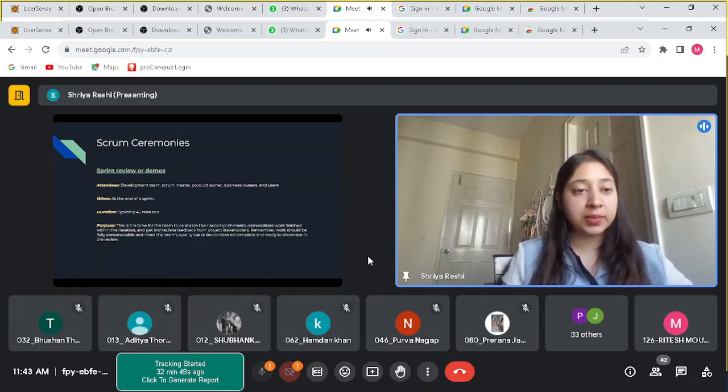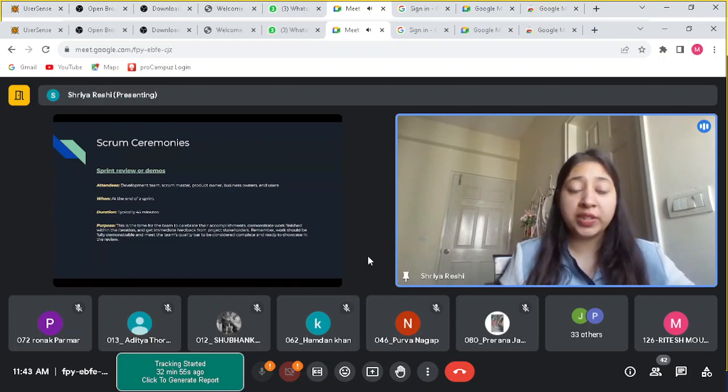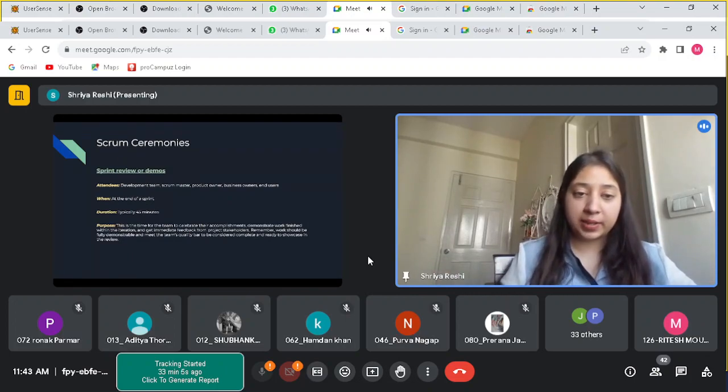Now, why this is done is to get instant feedback from the business owners and the clients. If they don't like something in the homepage, rather than waiting a full 3 months and then getting their feedback, we are getting it in just 2 weeks. And we work on implementing that feedback. Like if they say they don't like this picture or they don't like this button, we keep a note of all those feedbacks and then we implement them.